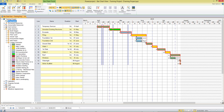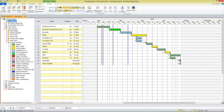The next thing we'll take a look at is the format tab. If you click onto the format tab in your ribbon, there are a number of show/hide buttons that can control how the Gantt chart looks. Starting from the left, I might choose to hide my float from the project and to hide the critical path. I could even hide the links, creating a very simplistic looking chart just showing my activities and their durations and dates. I can put all of these back on at the click of a button.